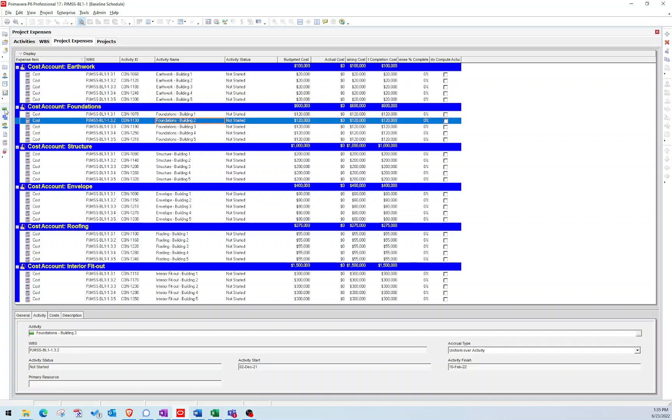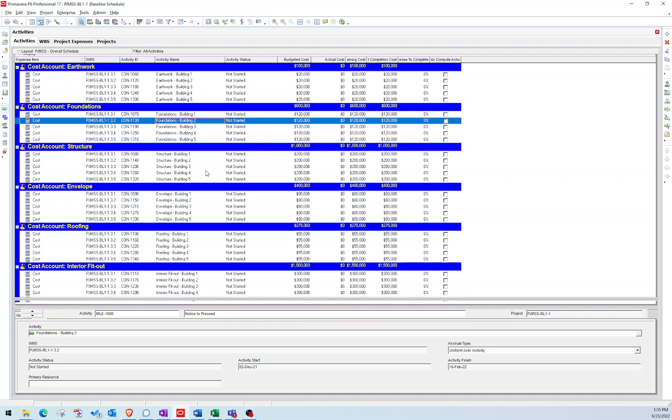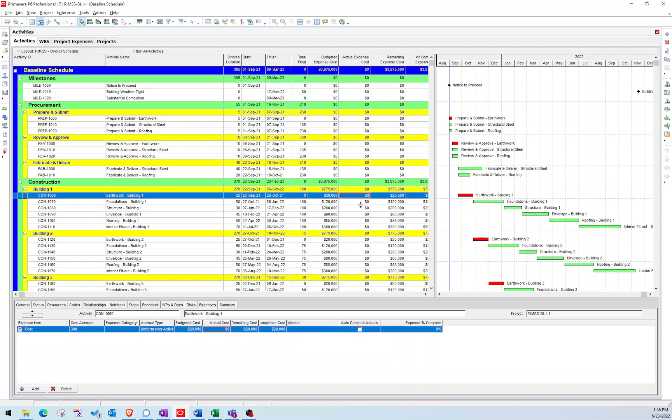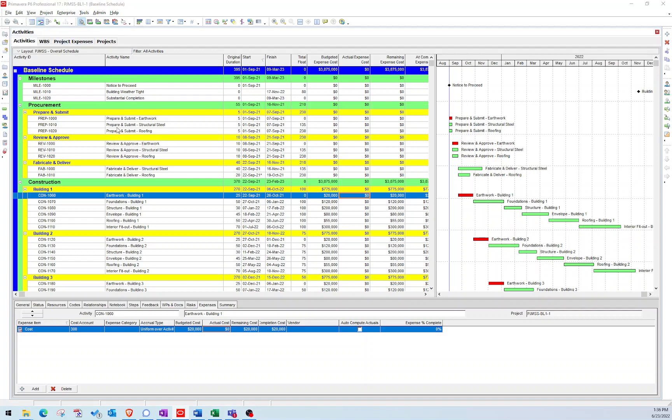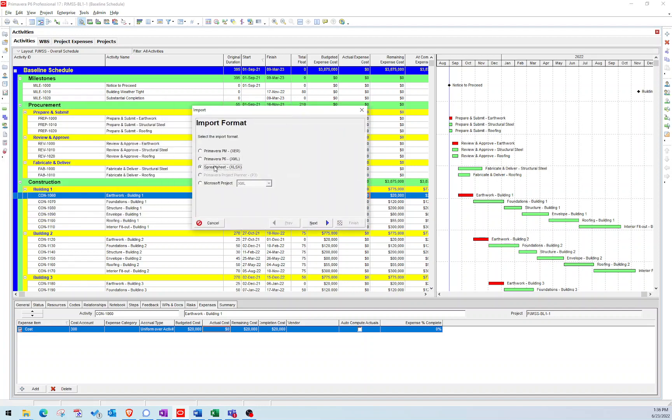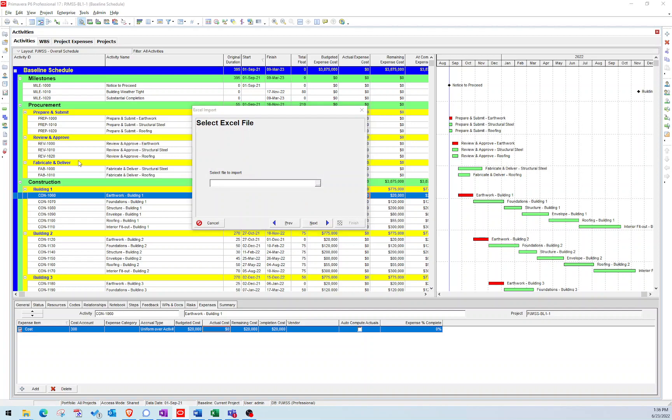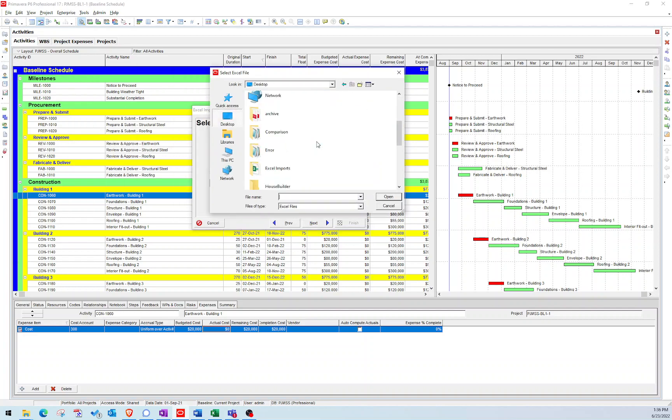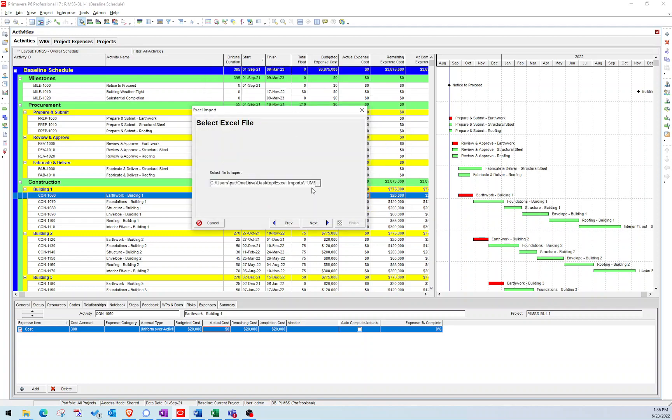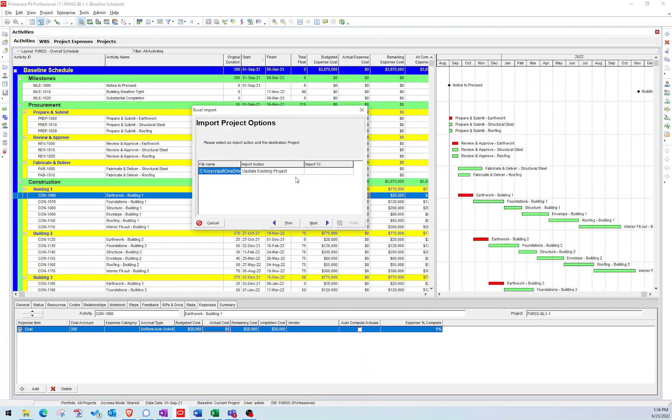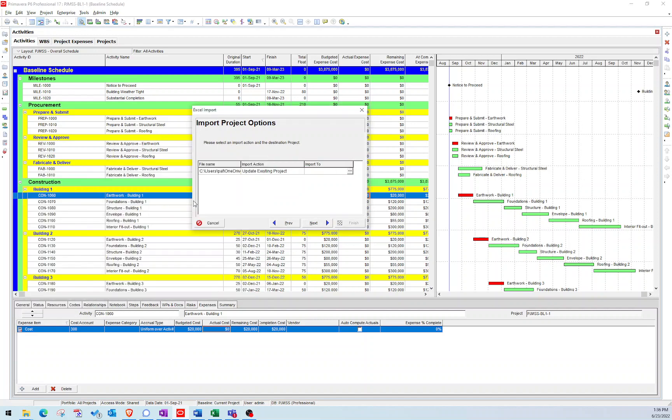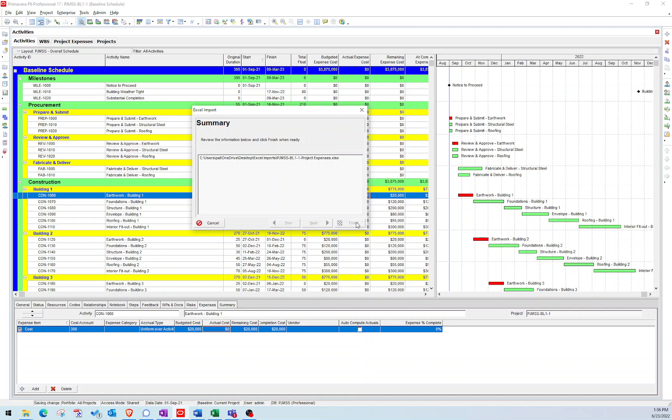Let's go back to my activities page so you can see once I run the import, you can see those numbers come in, those values. Focus down here as I run the import and you'll see it goes from $0 to the new values when I import them. So I'm going to go to file, import, and then run this little wizard here. Click on spreadsheet, next, select my file. And then I just need to navigate to that file that I had just saved, which is there. Expenses, update existing, import to this file that we're working off of, and finish.